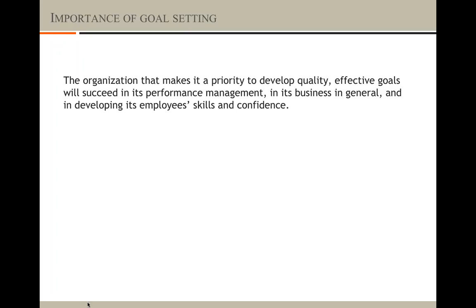Always brainstorm for solutions and try to replan, revise your completion dates when necessary, but only as the last resort. So, whenever an obstacle comes, we just think that we can move our date by 2 days or 3 days and just revise our completion dates. But that is the last resort. We should try to fill in the gaps. We should try to do it within the time frame that we have agreed for.